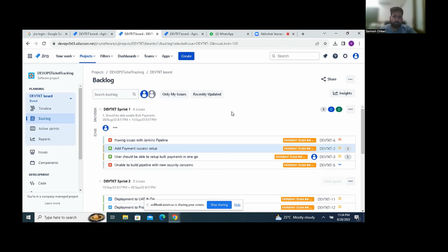On the day of the sprint, not everyone will be available for the next 3 weeks. Someone will be on vacation, someone will be on holidays, some might be having a different task, or if they are dedicated, they might not be comfortable taking 15. So with this capacity planning, we will know how many story points we can actually deliver in a sprint.